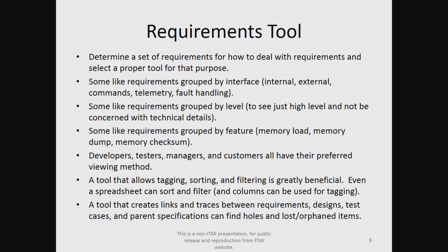So having a tool that can let you tag and sort and filter requirements can allow anybody to come in and say, okay, let me see everything related to memory dump or everything related to simulator testing, something like that. Also, a tool that can link requirements and can find all the traces between them can help find holes where requirements were never flowed down anywhere, or a requirement exists but was not derived from anything.